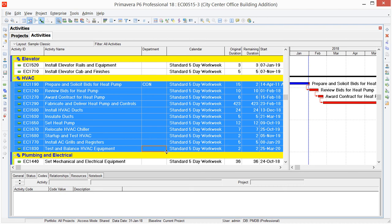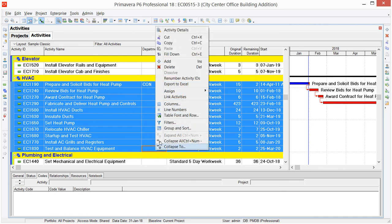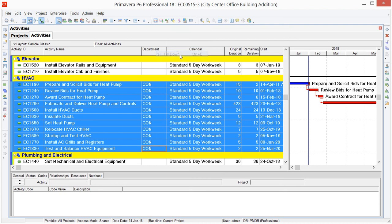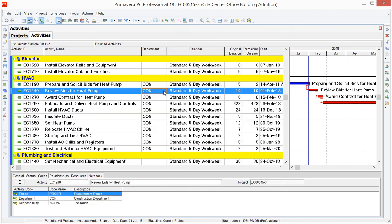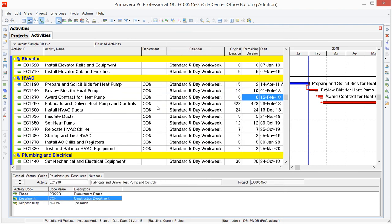So here I have my Source field, or this orange frame around that last field in that column. With my activities selected, I'm going to right-mouse click and choose Fill Down. So that quickly, all of these activities are now assigned to the Construction Department.